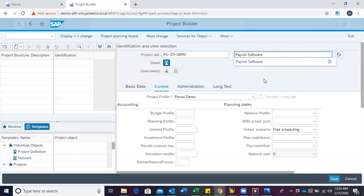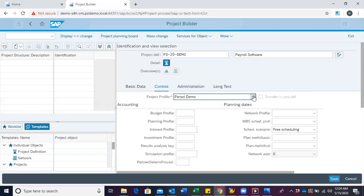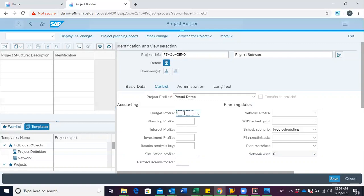After giving the description, we select the appropriate project profile. It is important to take note when selecting the project profile because after you have saved the project, you would not be able to change the project profile again.